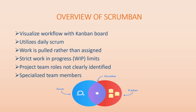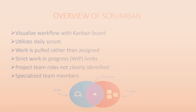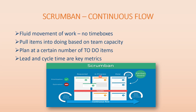In Scrumban, project team roles are not as clearly defined as in Scrum. In Scrum, teams are cross-functional — members should have knowledge of everything, so a UI person should also know backend. In Scrumban, however, specialized team members are preferred — a person should have deep expertise in one particular area, such as UI or backend. There are also two types of Scrumban itself.